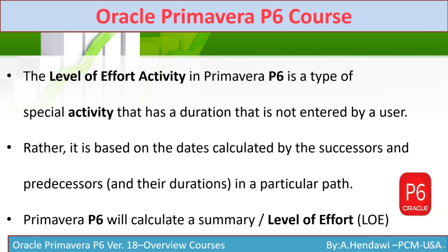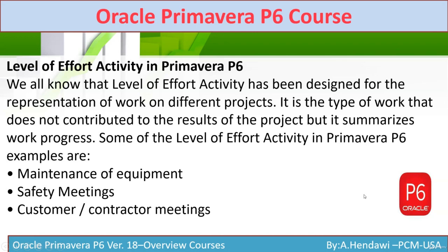How do you enter durations for a Level of Effort activity? The duration is not entered by users — it gets its duration from its successors and predecessors. Why do you need Level of Effort? To summarize many activities in the schedule rather than adding many details. The Level of Effort will summarize those activities in P6.